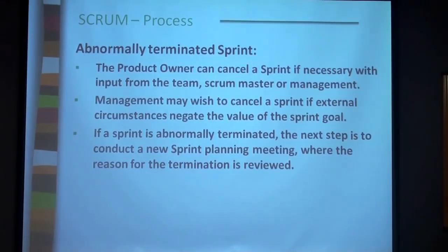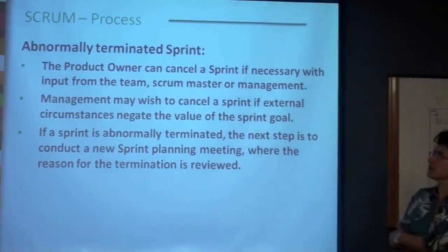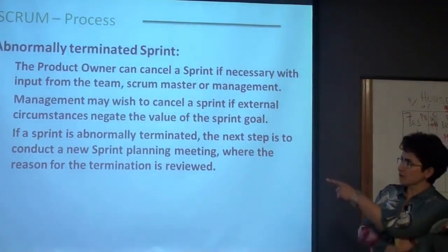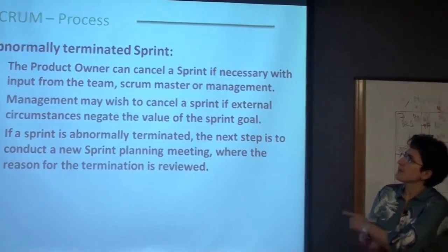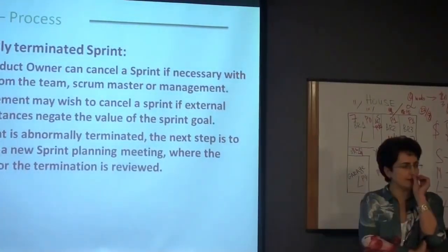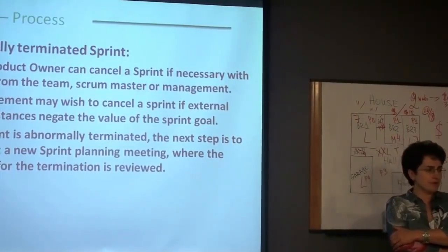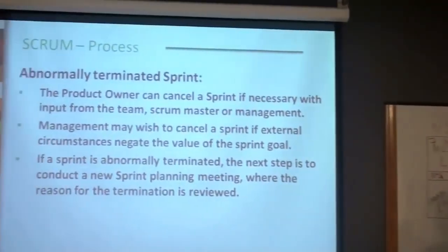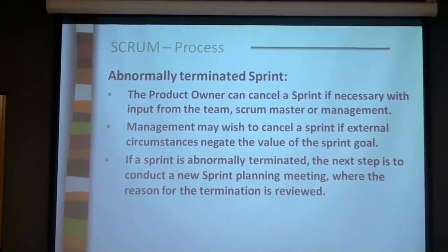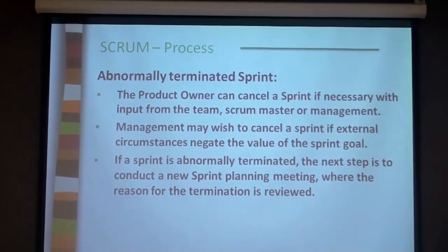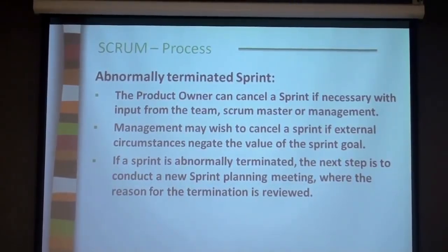A couple of things to reiterate. Sometimes you may need to terminate sprints abnormally, and we went through some burn down charts, and I mentioned that the product owner can cancel a sprint if necessary, based on the input from the team. For example, if the technology that was chosen did not work well, or the market changed, right? We don't need this set of features any longer. So the sprint can be terminated.